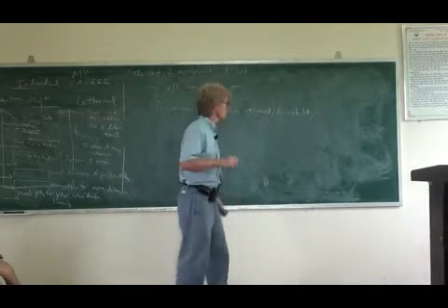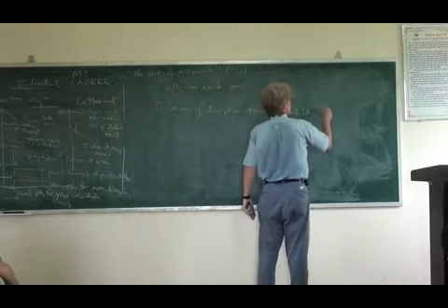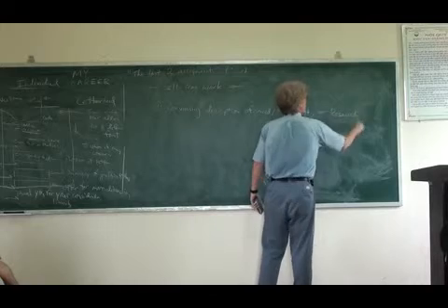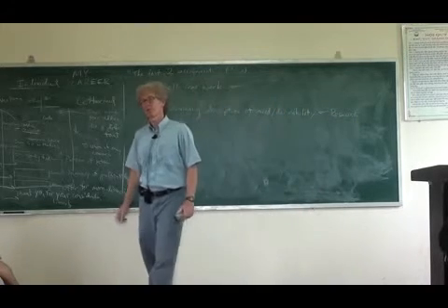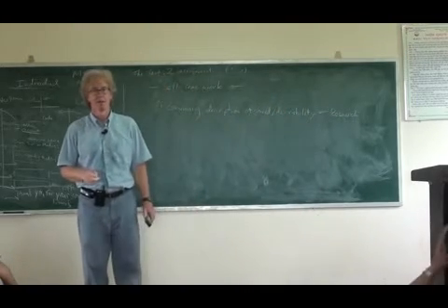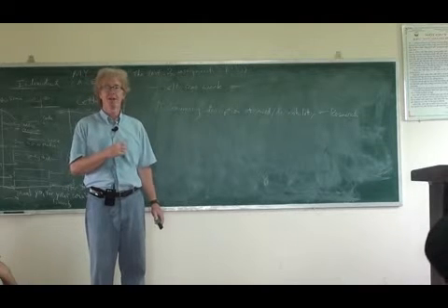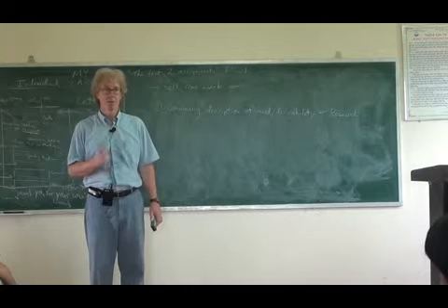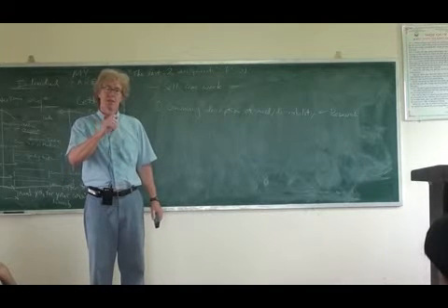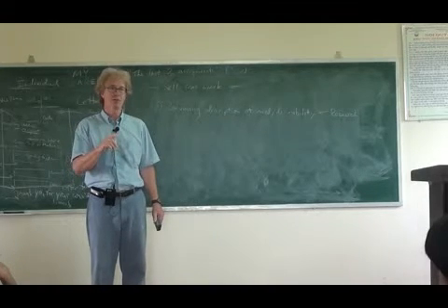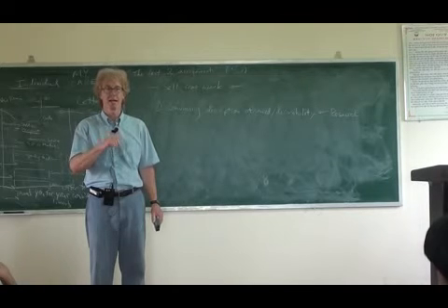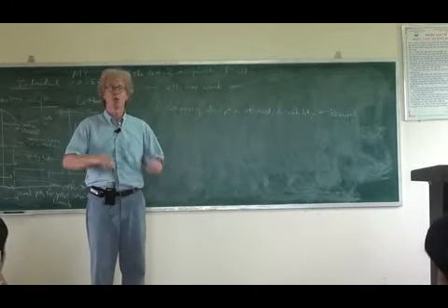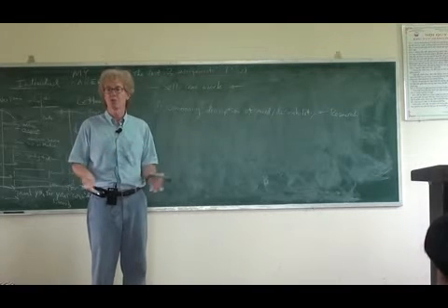And this often requires you to do a lot of research. The reason why you want to do a lot of research is because you want to sound really convincing. You can't say, I think it would be nice to have a new highway to Hanoi. That's not convincing. What is convincing is to say, in the last 10 years, there have been 4,921 traffic fatalities on the highway between Thai Nguyen and Hanoi. This human toll is too high.